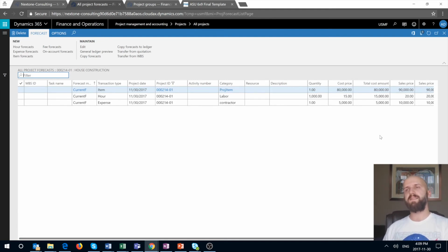So the total estimated cost is $100,000 and the actual cost was $20,000. Based on the cost principle, which is how this project is set up, we completed 20% of that sub-project, of that performance obligation, because we consumed $20,000 out of 100 projected.